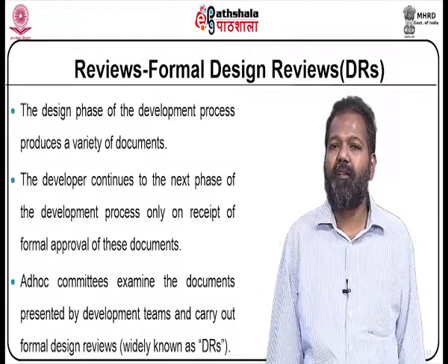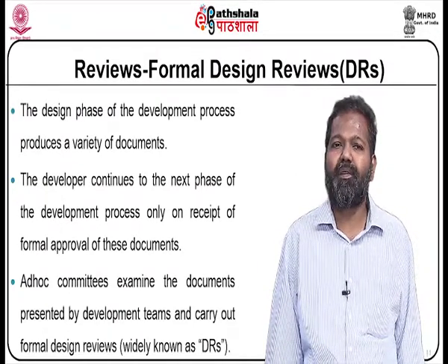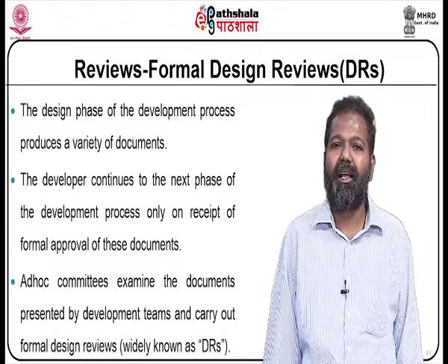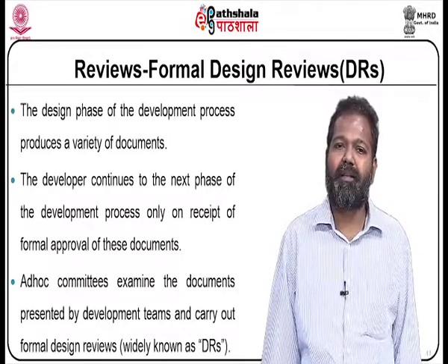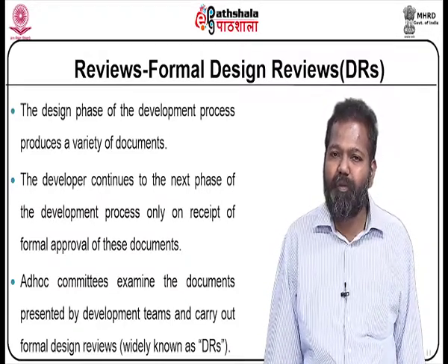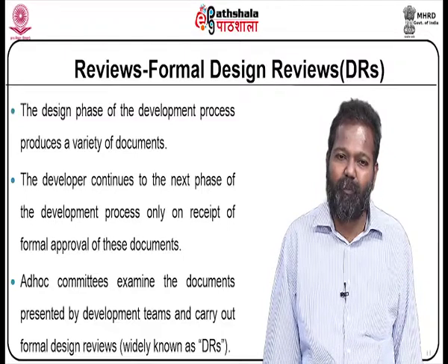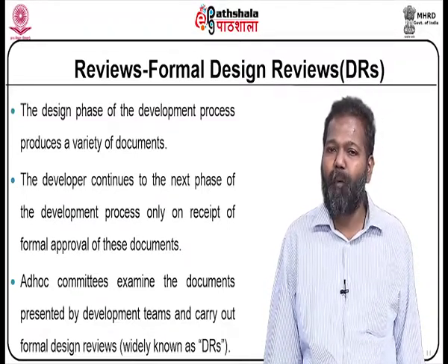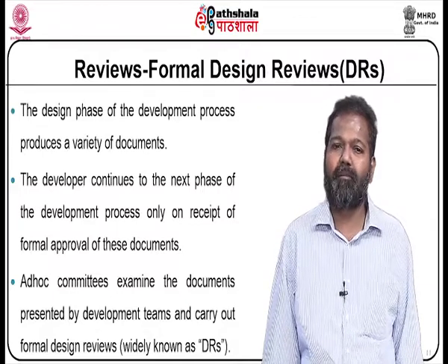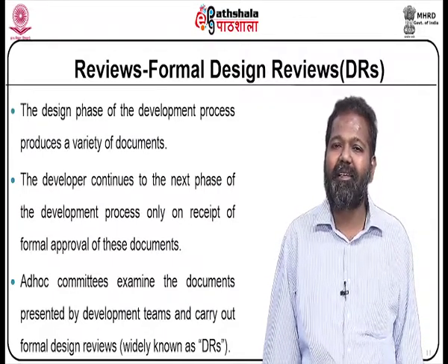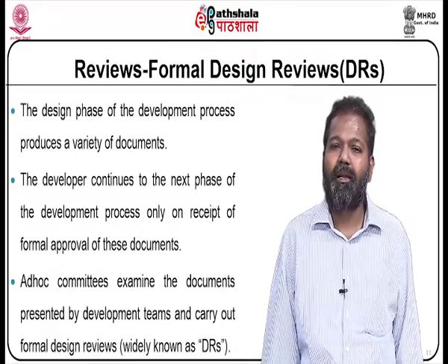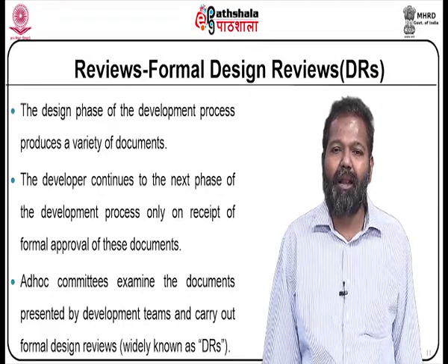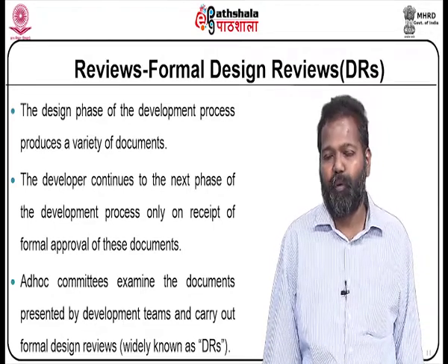Reviews: formal design reviews. The design phase of the development process produces a variety of documents. The developer continues to the next phase of the development process only on receipt of formal approval of these documents. Ad hoc committees examine the documents presented by the development teams and carry out formal design reviews.